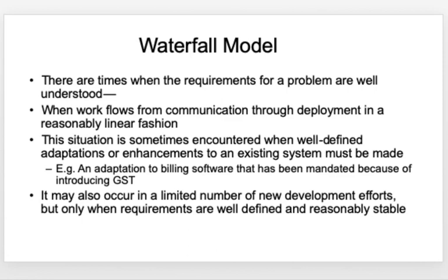Sometimes you can also use the waterfall model for new development efforts, but the condition is that requirements are well defined, reasonably stable, and well understood. Then you can use the waterfall model to develop your project.